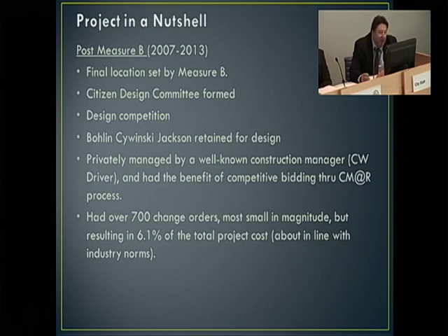They proceeded with that design, and we also had a building committee formed at that time, which also adopted two members from that design committee to serve with them to guide this process of design. We also at the same time decided to hire CW Driver, a construction manager for the project, or actually a project manager initially, until the construction would begin. And they came on board early so we could really keep an eye on constructability along the way.